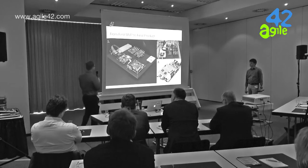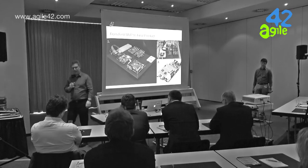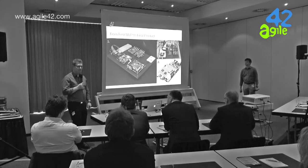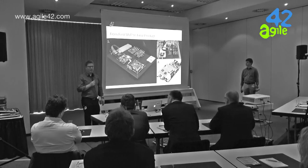And this is the first year. This is actually the first version of the product. And guess what? The team, in terms of hardware, had only developed wires for this, because they bought a lot of evaluation boards from the different technology vendors that they chose. So there was one evaluation board for the DSPs, one for the host processor, and two evaluation boards for the interfaces they wanted to put in this product.